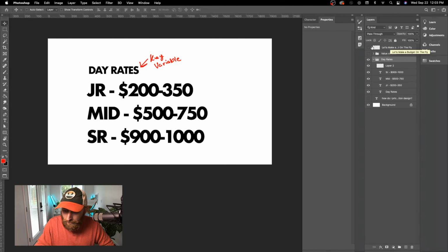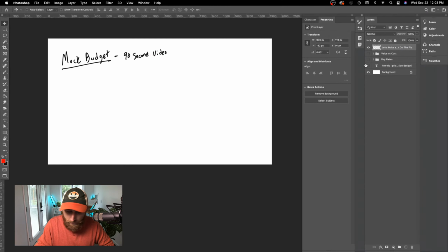Let's quickly do a mock budget. Let's say a client reaches out, they want a 90-second video. Let's say I'm a mid-level artist, so I'm going to charge $500 or $600 a day. Let's say $500 a day to make the math a little bit easier. Basically, we just need to do a cost analysis of the project, and because we're using day rates, it's really a number of days.